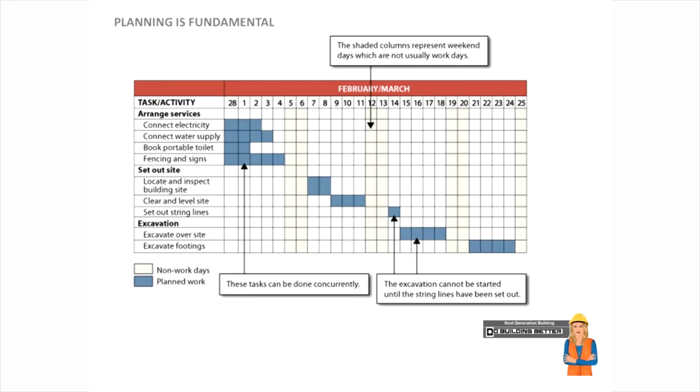And this often happens during the preliminary phases. So we can lack time at the slab stage or the stumping stage of a project, and then again at framing stage. So if this starts to happen on a regular basis, then we'd go back and look at your processes on how you're building, and we can fix that. But really, you've got to start by plotting it onto a Gantt chart, which will then enable you to get better, quicker, and more efficient at the way that you build and the way, of course, that you run your project.